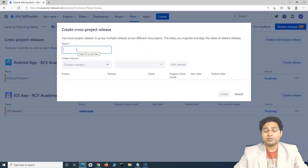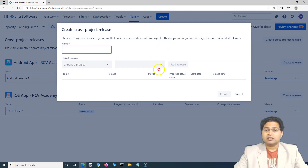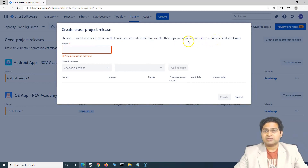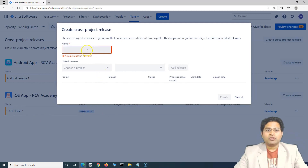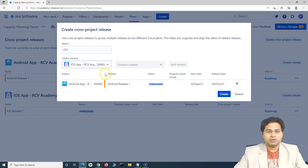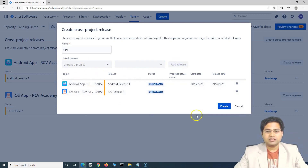Now, to create a cross-project release — what exactly is it? It is just for reference purposes. Cross-project releases do not get saved into the Jira instance when you do the review changes. They are only for the plan, grouping multiple releases. The benefit is that it helps you organize and align the dates for related releases. Say both releases are happening at roughly the same time — within a week's difference — so you can see the details of both and align them. I'll name it 'Cross Project Release One' and choose the projects to include.